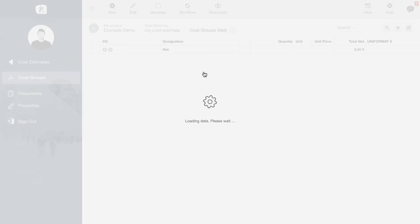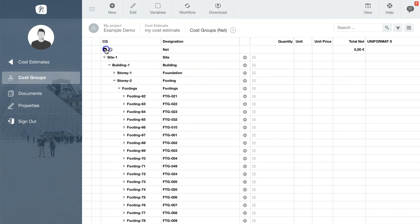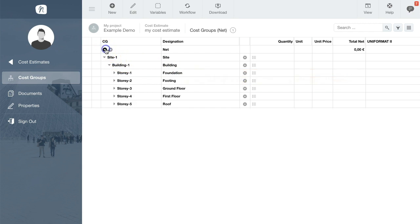Now you can see the breakdown structure of your project, the building, the stories, the families and the individual components.